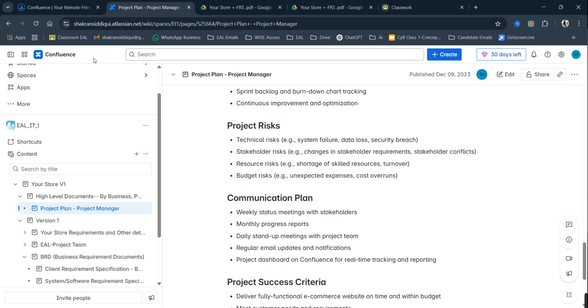Then, upon creating the PRS and all the requirement analysis, we had fixed that this will be the logo. Then started the sprint. Now, upon creating the logo, the stakeholder or the client comes up and says, "I need to change the logo. I don't want this logo. I want a different logo." Then we need to do all those things again. So this is a potential risk.